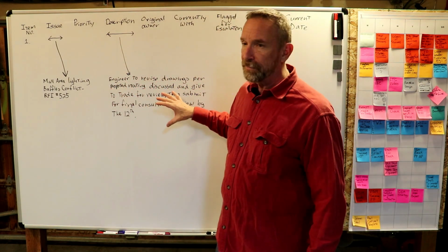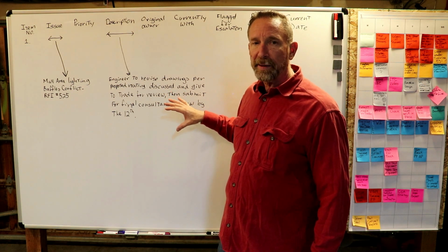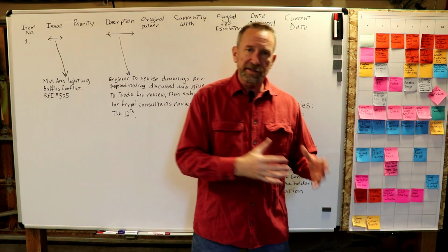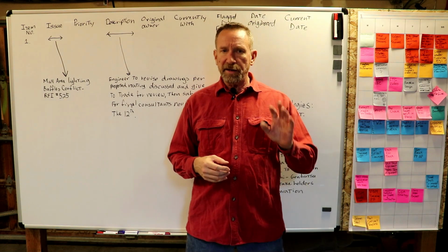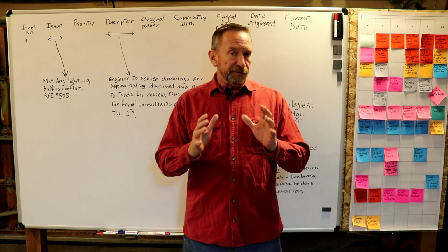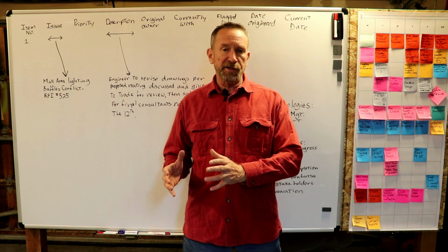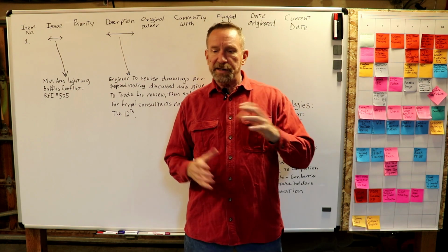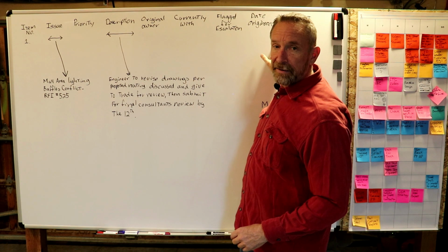So one of the methodologies that we found works really well is to let everybody know, look, in a couple of days, in 2 days, you're supposed to have these shop drawings complete and to the trade. Do you remember that? And oftentimes they'll say, oh, no, you know what, great, thank you. I didn't realize it was down to 2 days or tomorrow or something to that effect. The effectiveness of that is incredible. People knowing even just a day ahead of time often is key. They will get it done. Often we've seen them stay late at night to get it done because they don't want to be that one person in the process who didn't get it done, right?